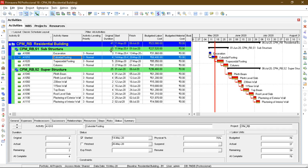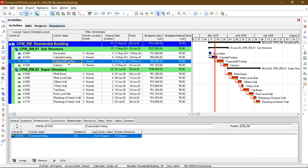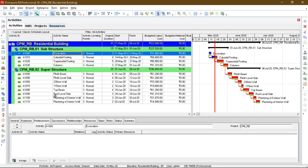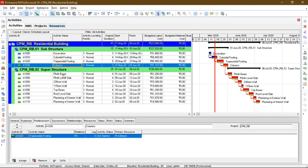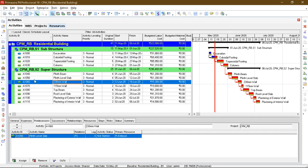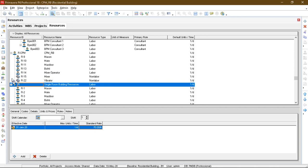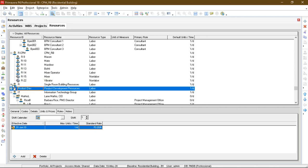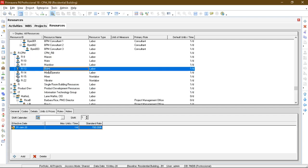And as you can see this is the Gantt chart. I have defined the number of days, start date and end date. Also I have defined the predecessor of each activities. As you can see, excavation activity has no predecessor but has a successor. The predecessors of these activities are all defined. Then I have defined the resources as you can see in the resource tab.